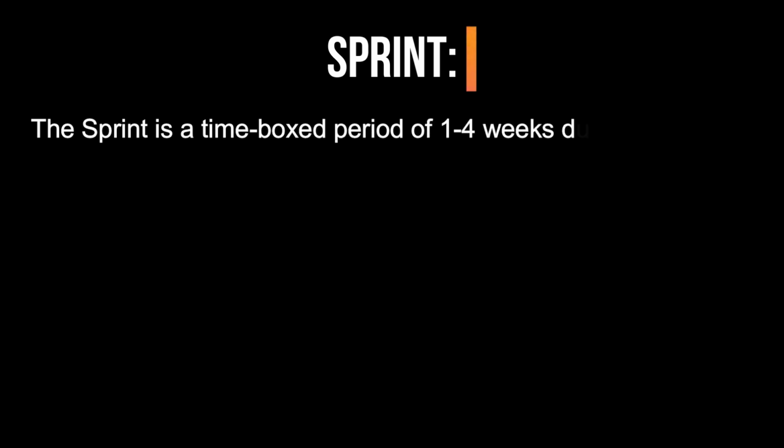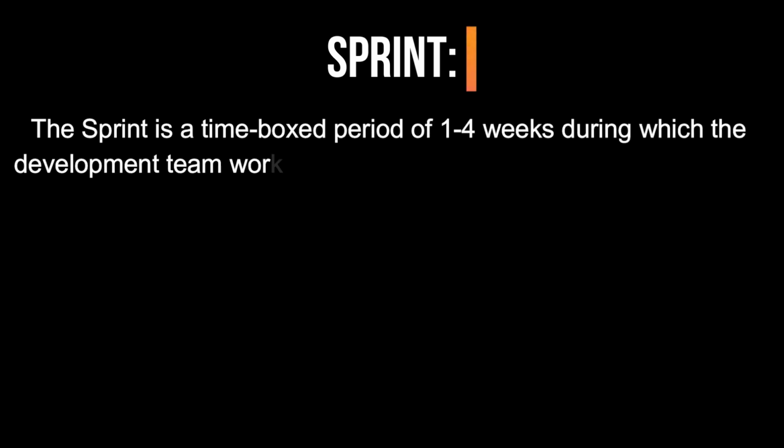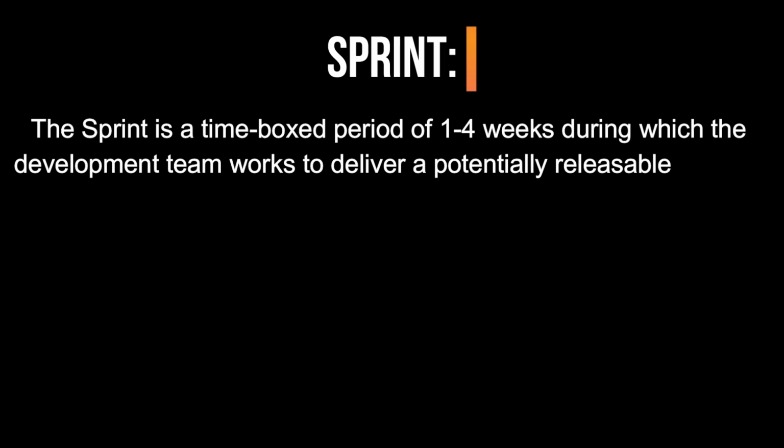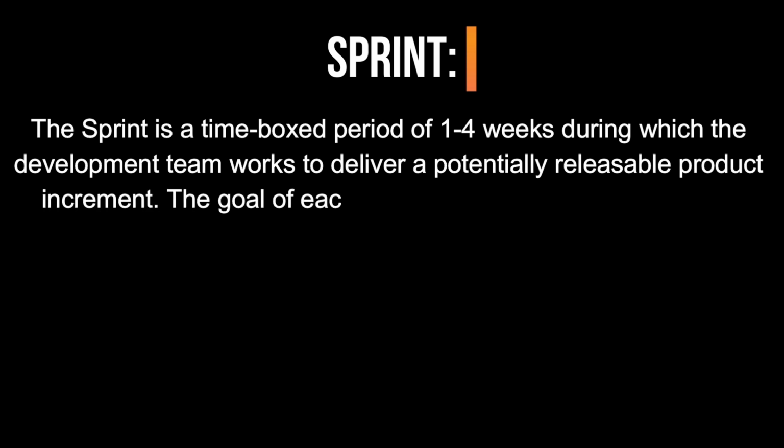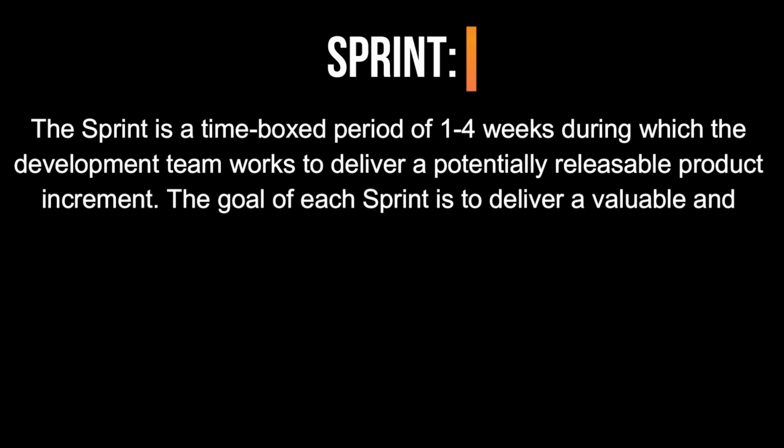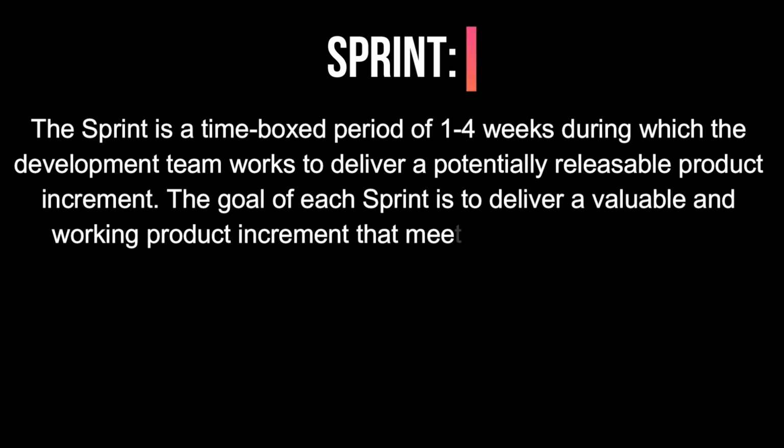Sprint. The sprint is a time-boxed period of 1 to 4 weeks during which the development team works to deliver a potentially releasable product increment. The goal of each sprint is to deliver a valuable and working product increment that meets the definition of done.